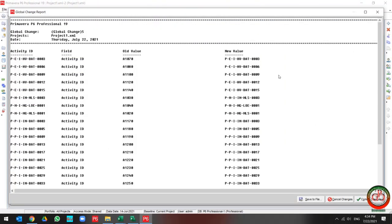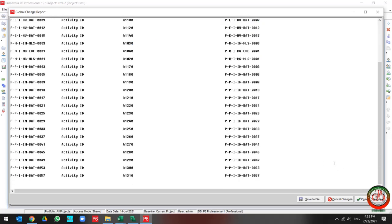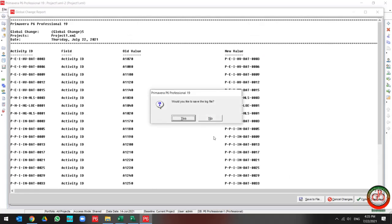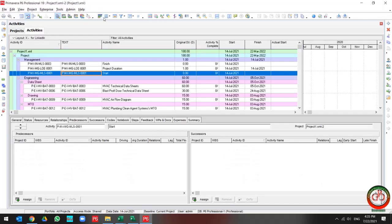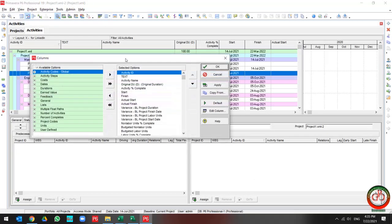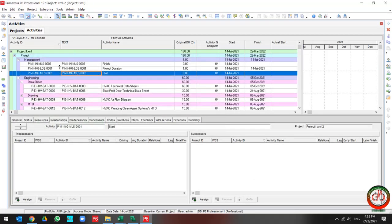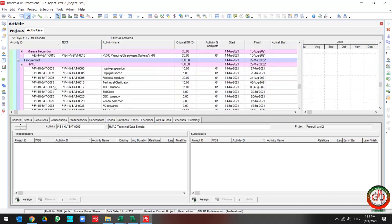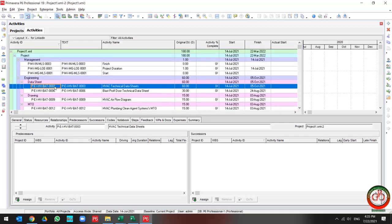Before P6 applies the global change, it shows you the log like this. This is the old value, this is the new value. Then if I press commit the change, all the activity ID updated based on my available new value. Right now, I don't need anymore the text file because all the text files copy and paste to the Primavera P6 fields. So by this solution, you can instantly update activity ID and insert the Microsoft Project file to the Primavera P6.